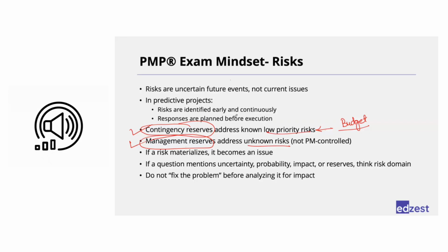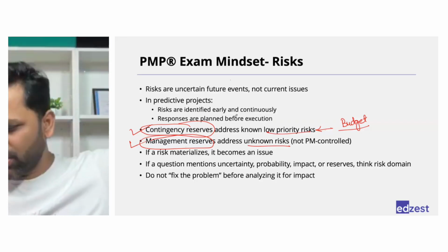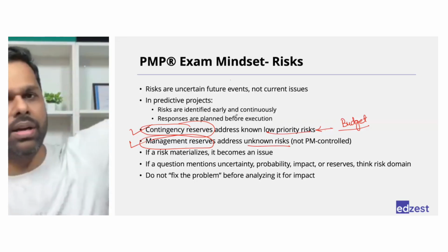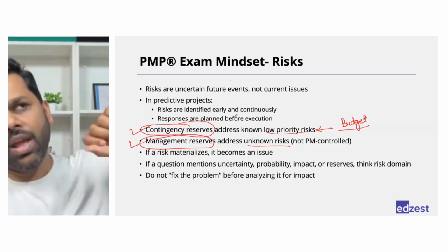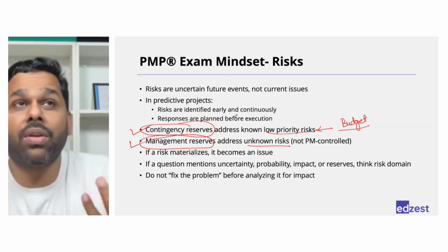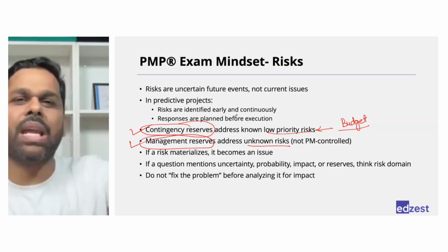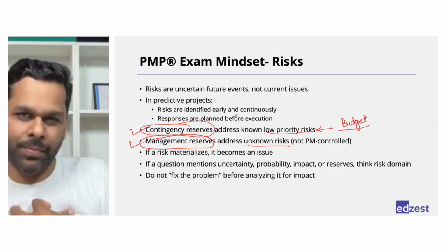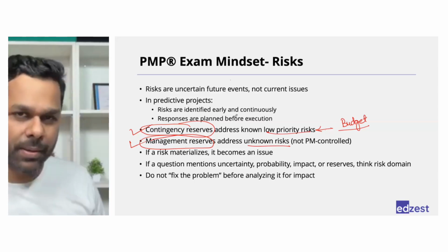So there is no reason why we should return the money back to the customer. Back to the organization means, yes, the sponsor is a part of my organization. I can return it back to the organization. There's no problem in that. But returning it back to the customer doesn't happen. I could say that, okay, my cost is reduced, so I could bring some new offer, could give you something extra. That would be my strategic decision. But I am not liable to return the money just because I saved the money somewhere.